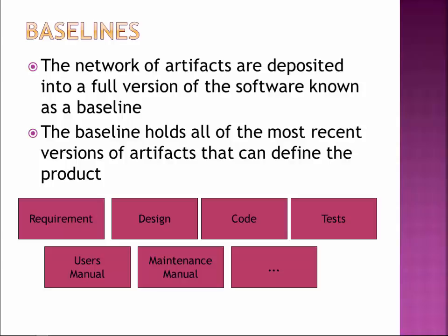The idea of change then means I have to baseline an approved set of what we think is happening in my application. So these are the requirements that I think we're building. This is the design that ties to those requirements. This is the code that's implementing that design. These are the tests that test all the stuff that we just talked about. That baseline of artifacts defines a state that we're trying to get to, or a state where we're at, either way, based off of whatever the network of dependencies are.